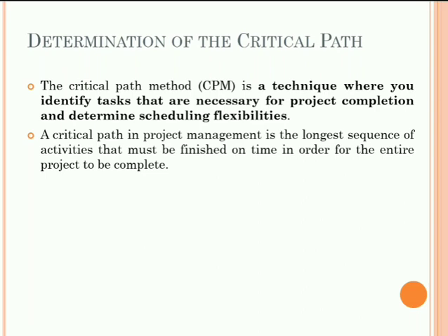The critical path helps to avoid bottlenecks also. Bottlenecks in a project can result in lost valuable time. Plotting out the project dependencies using a network diagram will give you a better idea of which activities can and can't run in parallel, allowing you to schedule accordingly. Getting it? Why the critical path method is necessary? These were some of the reasons.